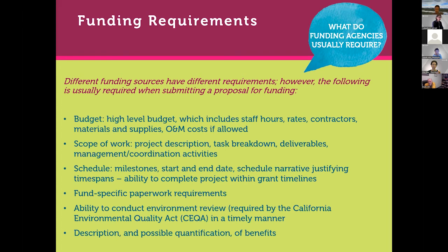Another term that you might hear for this is shovel-ready projects. And so if you want to have your project considered for round 2 IRWIM funding later in the fall, you're going to have, basically, a shovel-ready project. It's going to have a high-level budget that includes staff hours, rates, contractors, materials. It's going to have a scope of work, a project description, deliverables, management coordination activities.